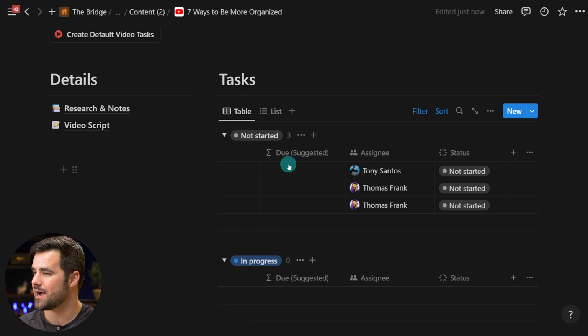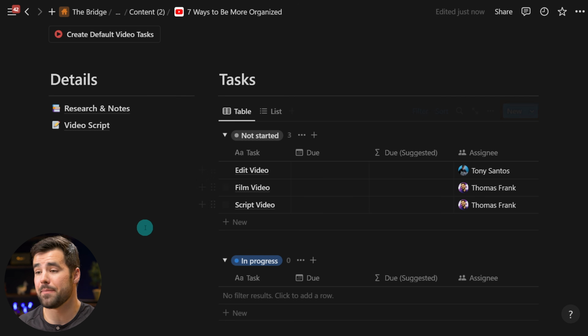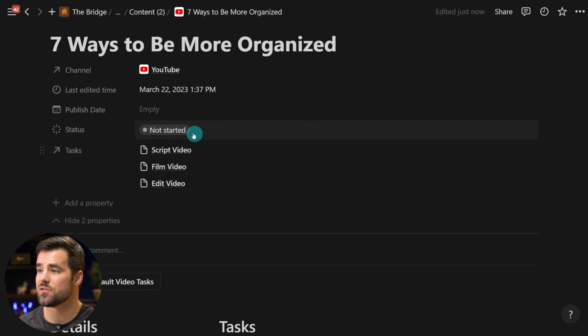And if I drag this over, what we can actually do, and this is kind of a stopgap until we get better automation tools for this particular workflow from Notion, is we can suggest a date for each of these tasks based on the published date of the video. So for example, if this video is gonna go live a week from now, I might wanna have the script locked 2 days from now, or maybe 5 days from the published date. I might wanna make sure that we have the video filmed 4 days from the published date and edited fully 2 days from the published date so we have time for review.